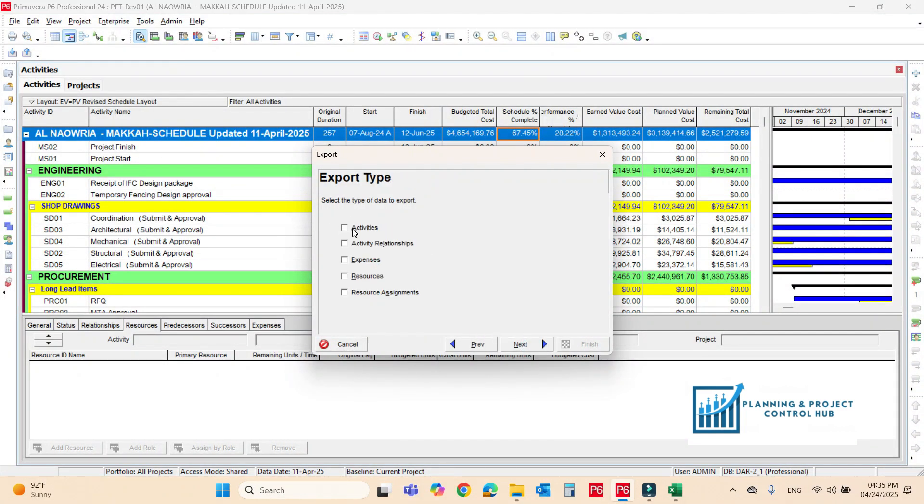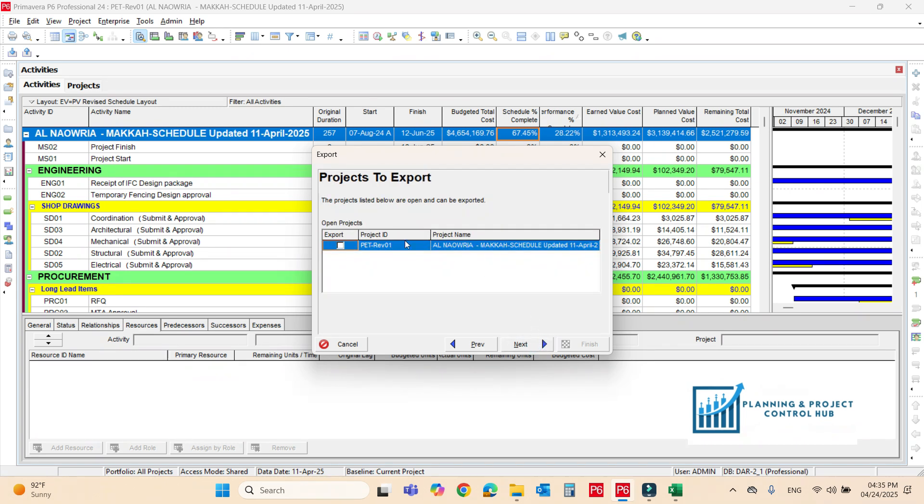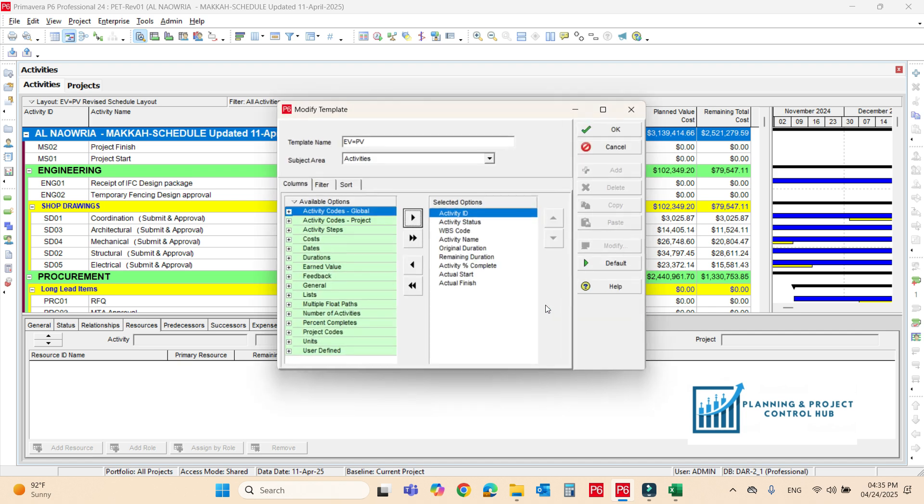Next. Activities, you need to export activities, activities relationships, expenses and resources on the left one. Next, next, next. I have already made the layout here. Just follow this layout. Each and every step here.